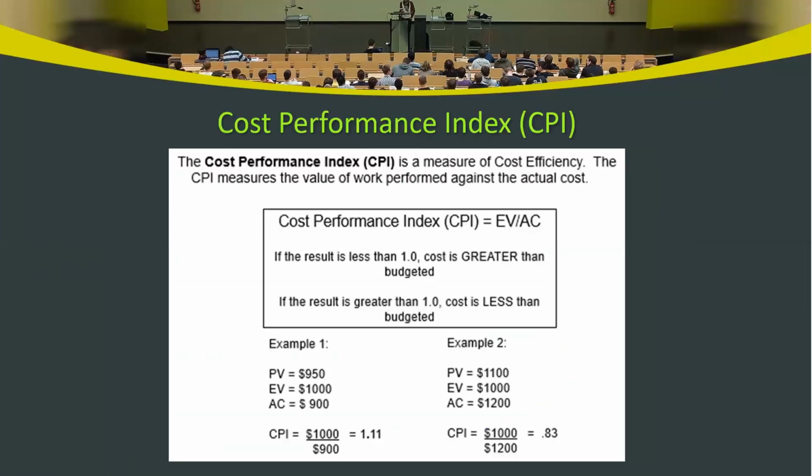Okay, now we know that the project is behind schedule, but is it doing okay cost-wise? Now we have to find the efficiency so that we can use this value to project the future, plan for the future, forecast. For cost purposes, we need to find the cost performance index, CPI. CPI formula is EV divided by AC. Again, if this ratio is 100% or 1, that is okay, your efficiency is right. So you are spending the amount that you're supposed to spend as planned.